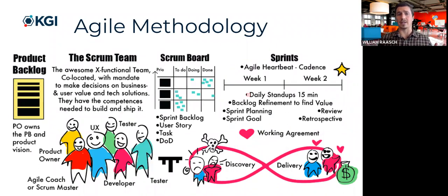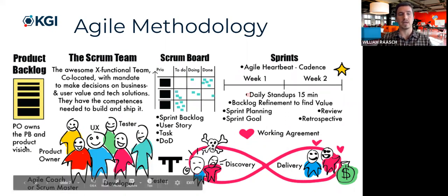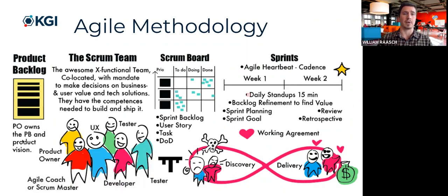So there's a lot on this slide, but it talks a little bit about what those steps of a given iteration are. First off, there's a product backlog, and we'll actually talk about that in the next slide. But this is essentially a list of all the features that need to be done based on customer input. So the product owner will own this, and they will then rank it based on priorities and then create iterations based on whatever the highest ranked priorities are.